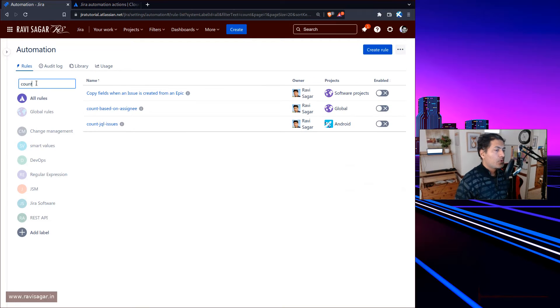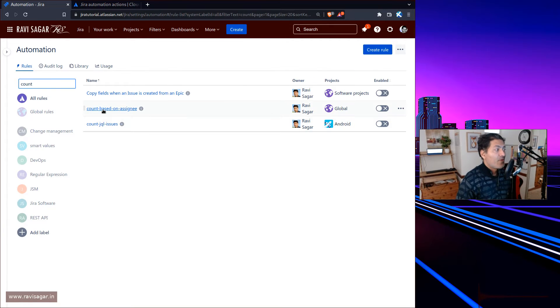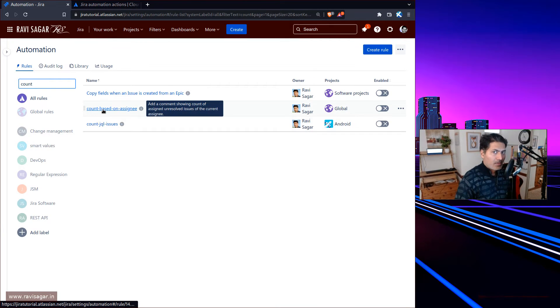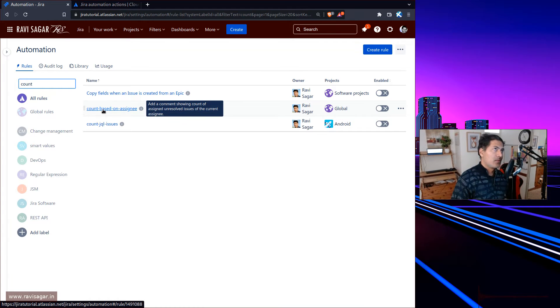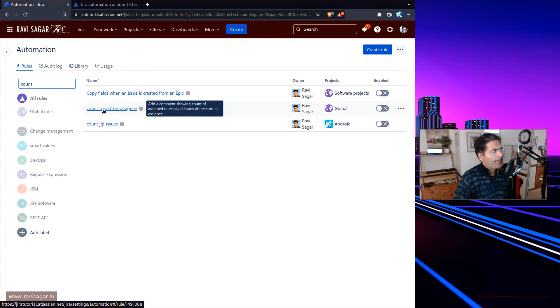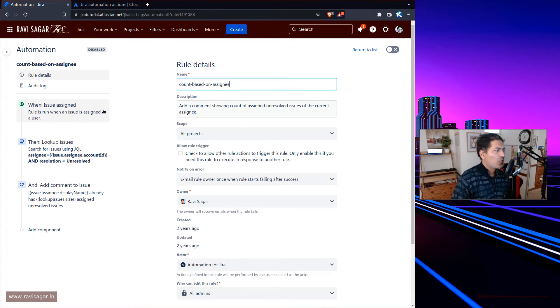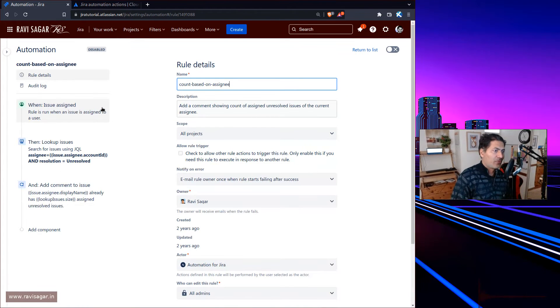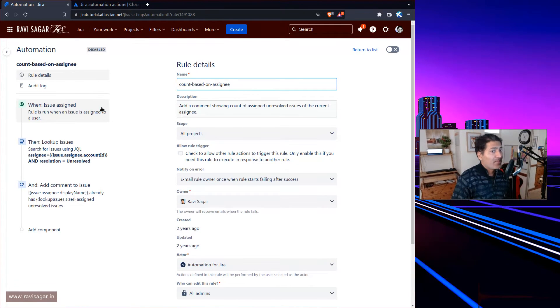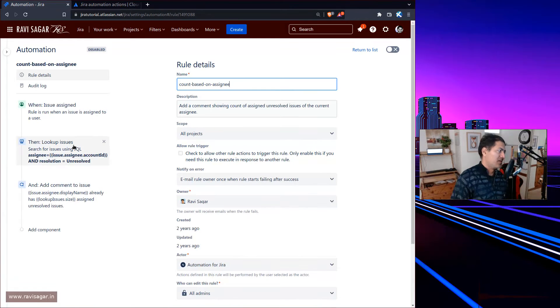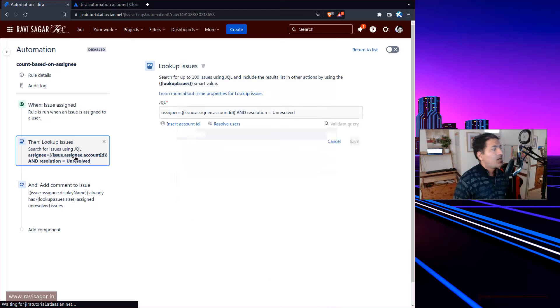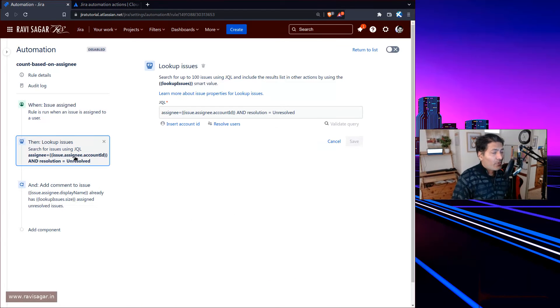But what you can do is use automation rule to tell you whether the particular user who is now the assignee of your story is already doing a lot of other activities. We're talking about only using Jira and Jira automation rules.